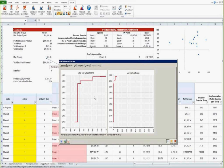You have three basic distributions you can use for expert assessment. You have the two-point uniform, which has a very high degree of standard deviation, which means a lot of risk, because your lowest point is as probable as your highest point, so no tails. And then you have the triangular, which has no tails because it has a min and a max. It's the sum of two uniforms. And it has a high standard deviation.